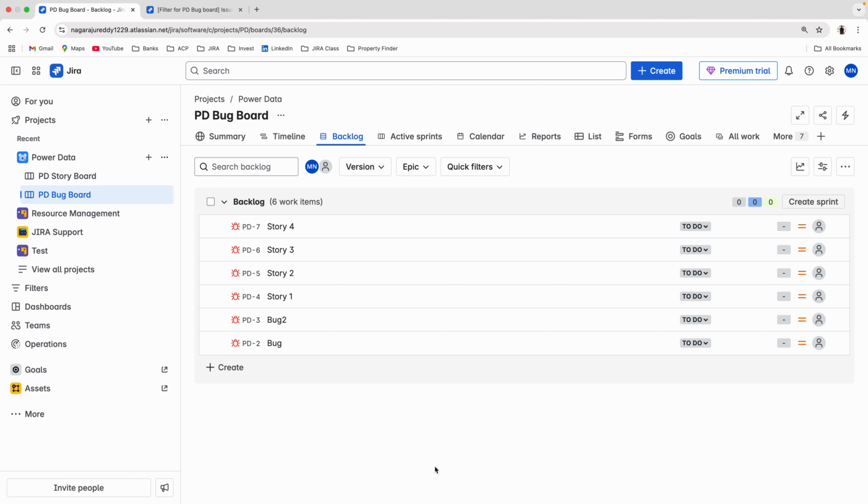When working on any project, they understand the design or planning and, based on that, create tickets. But whenever backlog tickets are there, the developer doesn't need to worry about them, because backlog tickets are created, but it is not decided when they need to be developed. In a backlog maybe 1000 tickets will be there, and you cannot work on 1000 tickets at once. So which tickets do you need to work on? What the Scrum Master does is create a sprint.